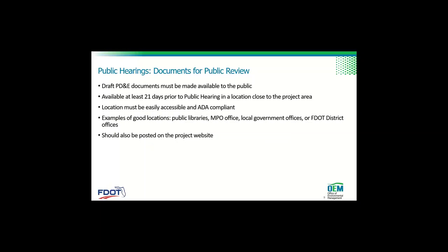Draft PD&E documents have to be made available to the public. This is in the federal law. They need to be available at least 21 days prior to the hearing in a location close to the project. And that's been a challenge for us during COVID because a lot of places are not open to the public. Oftentimes we use libraries or local government offices or our own offices, but those have been closed to the public. So we've been challenged with how do we make our PD&E documents available to the public.